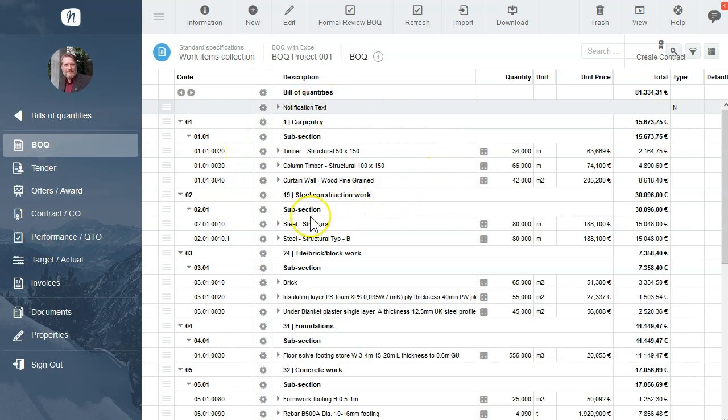This is the bill of quantities we imported as an Excel file in a further tutorial. Our BOQ assists tenderers in the calculation of construction costs for their tender and it means all tendering constructors will be pricing the same quantities and you are able to compare the prices afterwards in the offer overview.